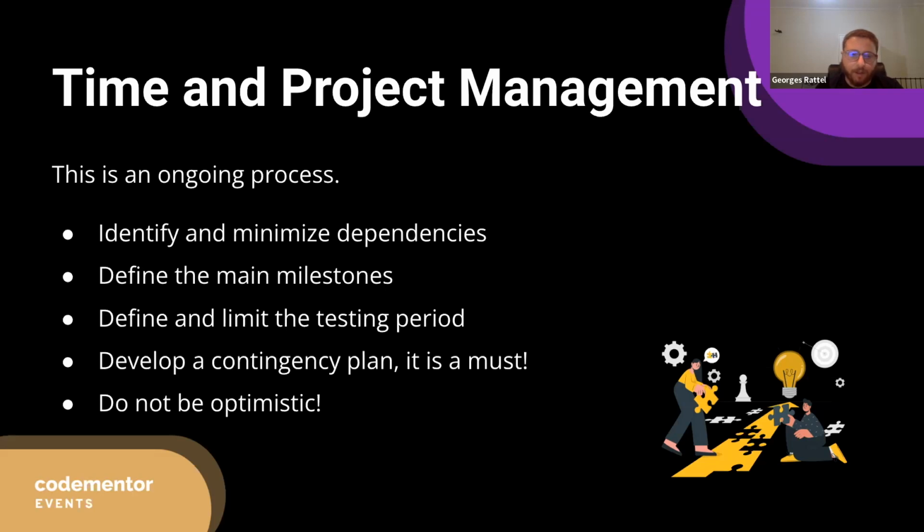We've actually done projects where we define the APIs at the beginning. The front-ender works at their own pace. The back-ender does a different sprint at their own pace, and then at the end of the project, it's as simple as switching from the mock APIs to the real APIs, and everything works seamlessly. And this can be done. It's not something that's really hard. As long as everything is well defined, this can really be done easily, and you can gain a lot of time during the project and minimize a lot of issues.